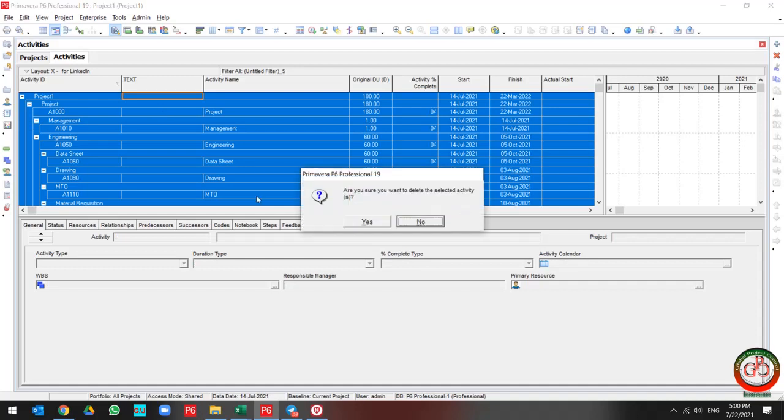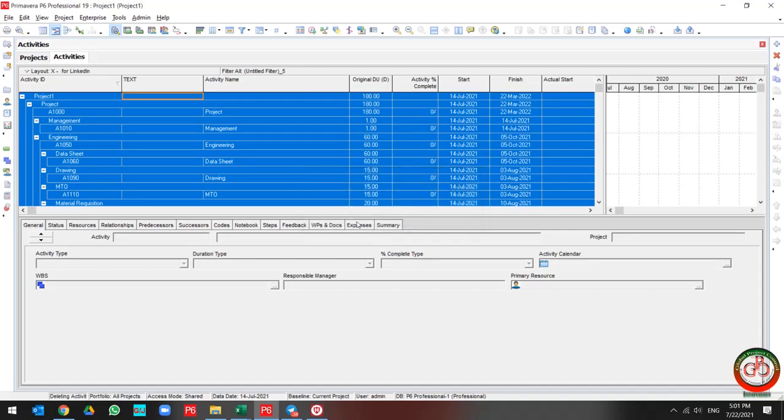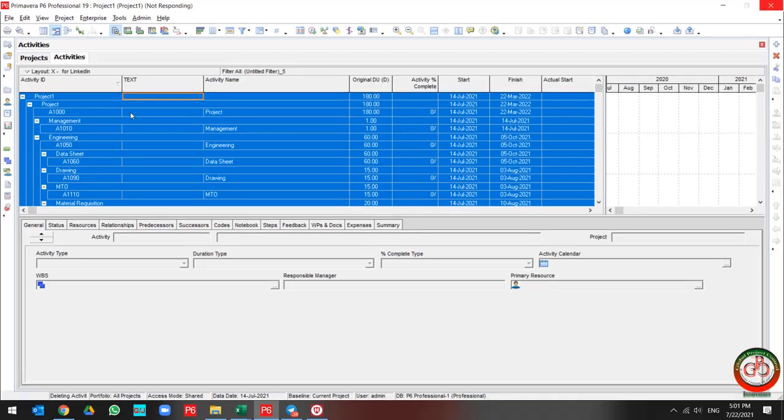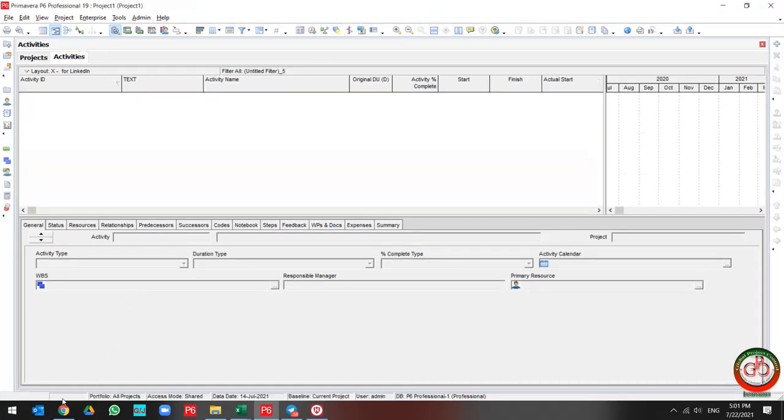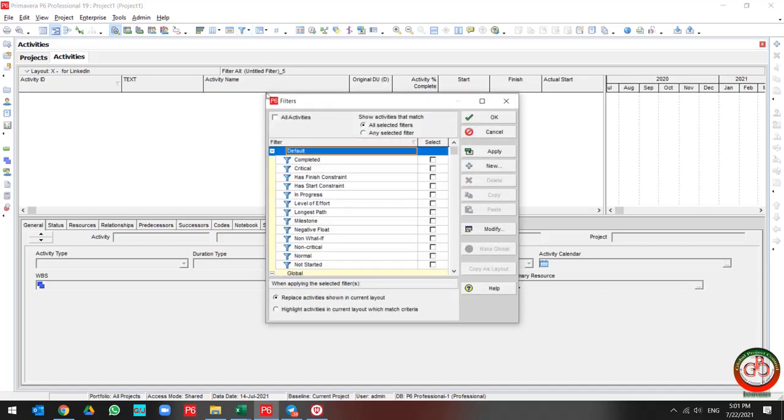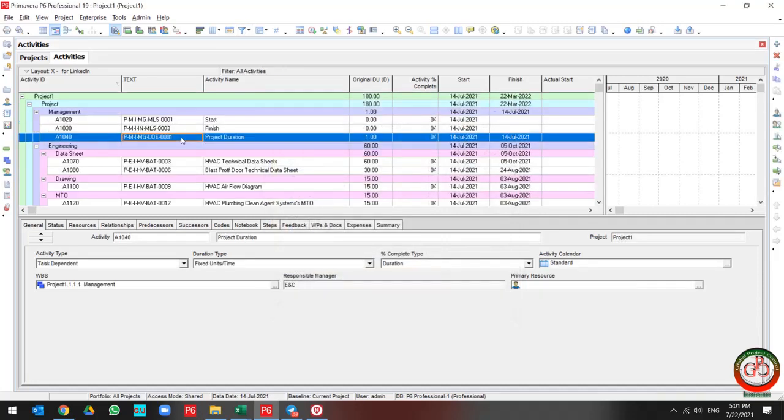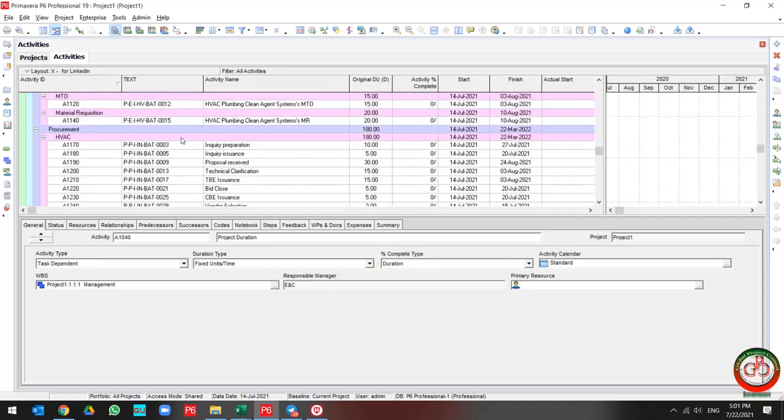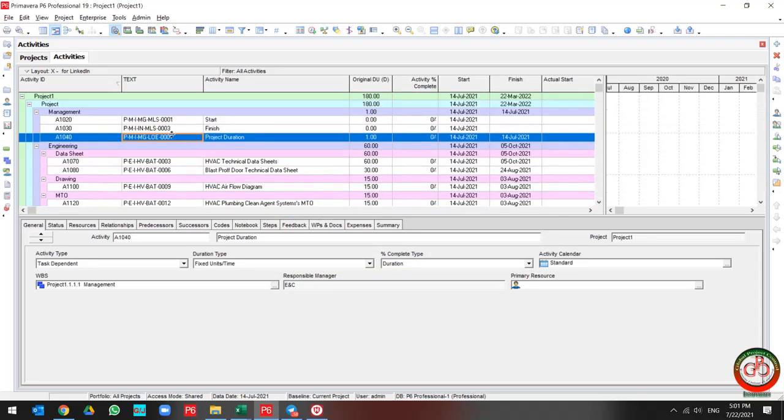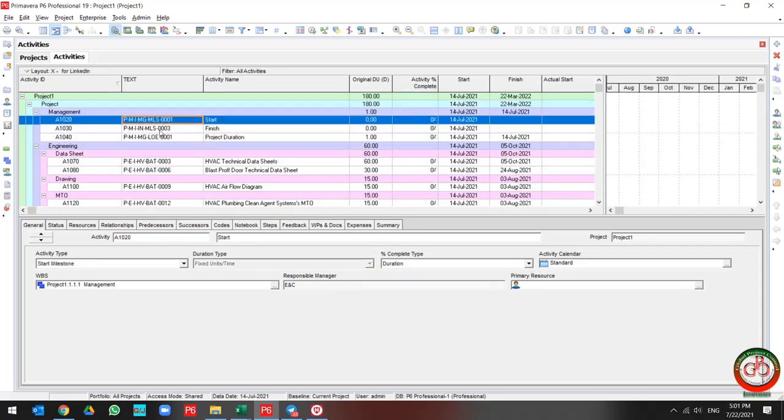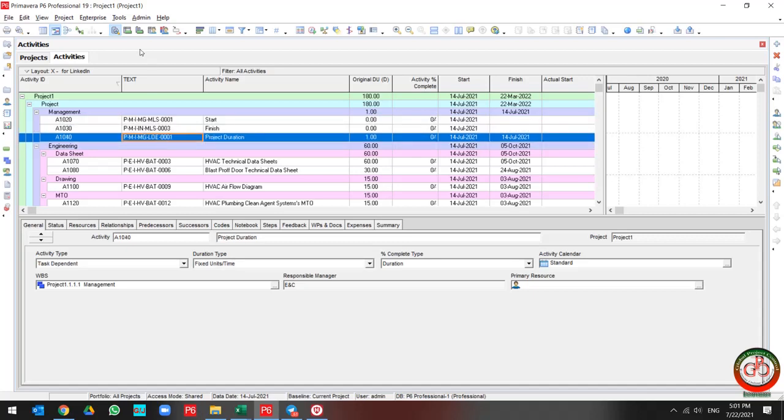By MPX file formatting, Primavera P6 is going to add another file for each level of WBS and call it WBS summary file formatting. So after inserting the file, you can create a filter by WBS summary and remove it. As you see, I remove all of these extra information and this is my pure project. I need to run a global change like the previous one to add the activity ID based on this information.